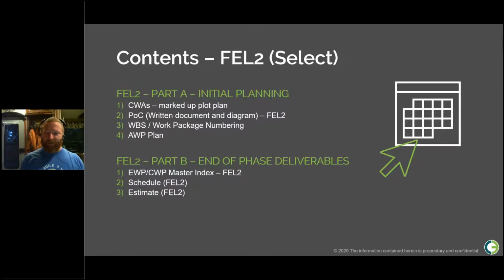The path of construction is the single most important deliverable for AWP on the project. Frankly, you can implement AWP just by doing a path of construction, even if you don't do all the stuff that comes after that. I've helped companies whose starting point is just to do path of construction from the beginning. So that is the foundational step of how to do AWP,